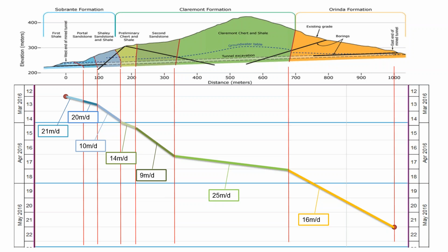When you design the TBM, order the TBM, deliver the TBM and start construction, this is an 8 to 12 month job. A TBM is not like a car which you can go and choose and start working. You have to design it, you have to order it, you have to wait for procurement, and then installation. As I said, this is 8 to 12 months.